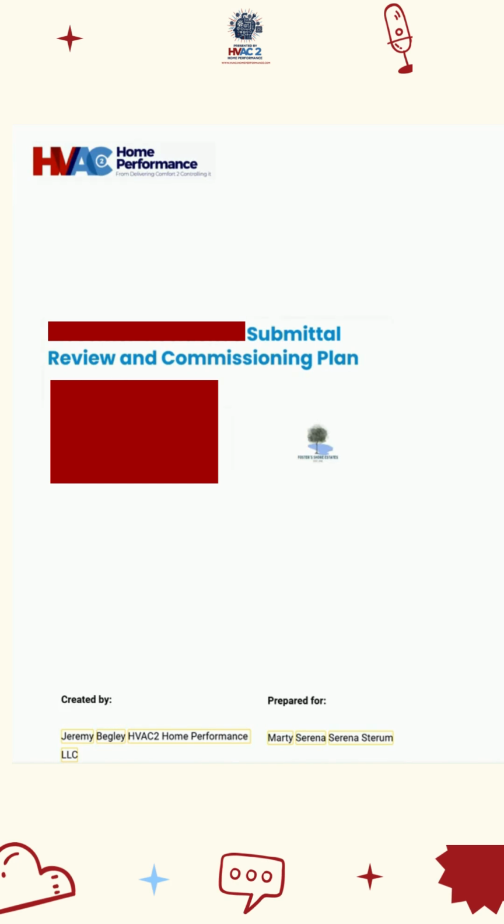I also have wrapped into this particular document a submittal review. Oftentimes in these high performance designs, once contractors go out to bid and go into what's called construction administration, which is the period after the design is done but before the project is being built, when contractors are getting hired and equipment's being purchased, there's often a lot of changes that people want to make. They want to change it to their own brand of equipment that they sell, or they don't like your ventilation strategy and want to do it a different way, or the controls are different than what they're used to. All these different things are changes that may or may not be wanted by contractors or builders.